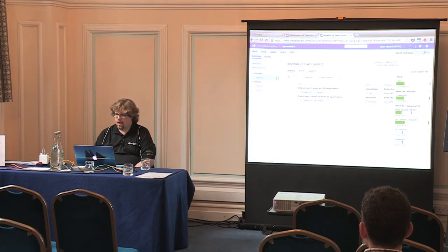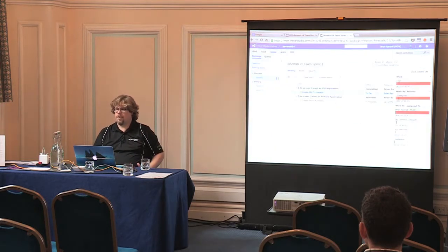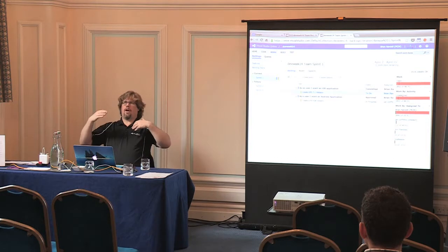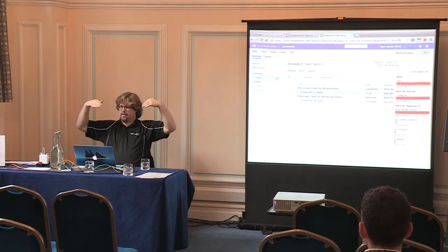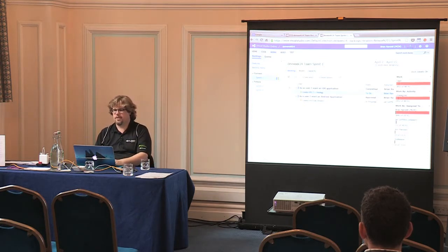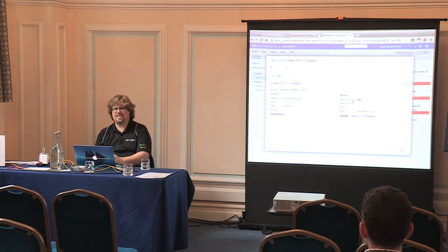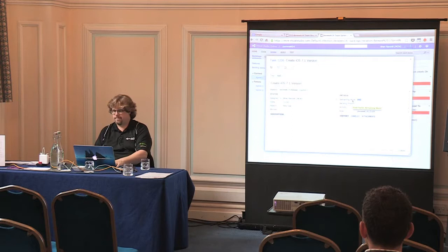If we go to the backlog and then go over to our work level, we see that we're not over capacity. But just for giggles, let's change the number of hours here to be 840. Sounds great. Watch what happens there. Immediately these bars go red because the team is now overloaded based on the number of hours, as is the individual, in this case, Brian. So it gives you a nice visual indication. It's not really a time tracker, it's not an hour tracker. It's just a way to help you with your team planning. It's back to 8.